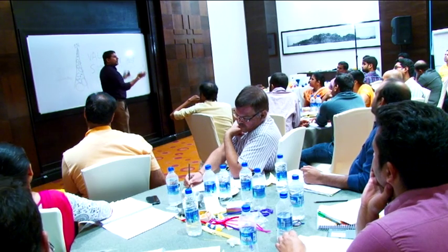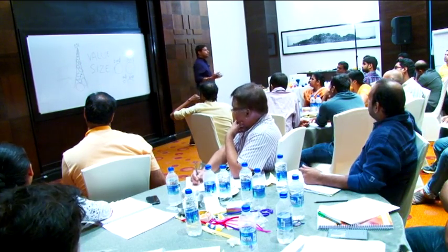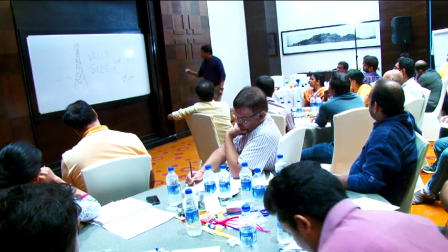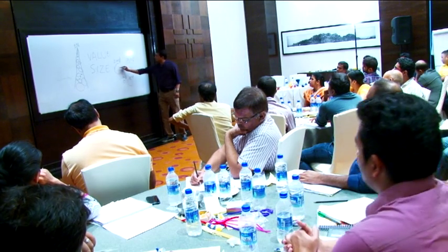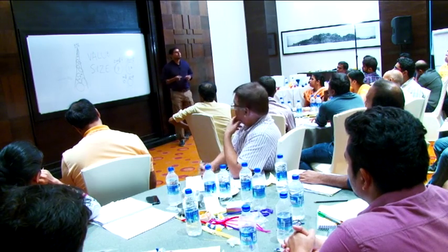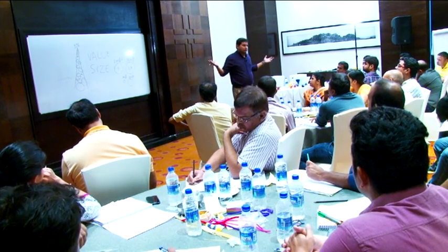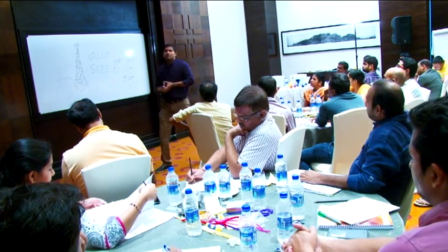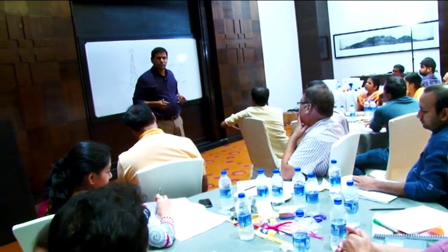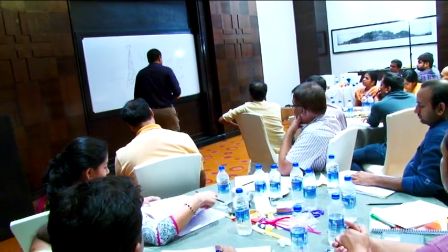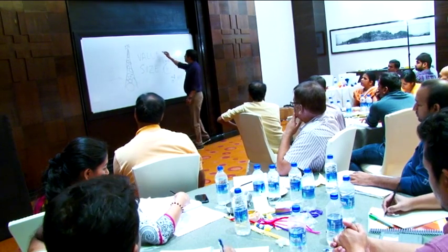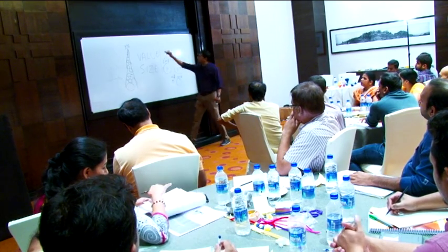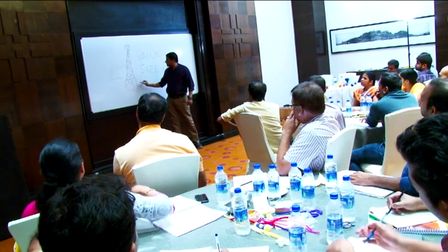So you need to collaborate heavily. Please remember, heavily. Product owner and the dev team. So how do they define the size? This is size. This is value. How do they define the size? So many factors. I may consider complexity, I may consider uncertainty, I may consider what kind of work is involved. It's a collaborative effort again, right? So these two factors are not related, but they help the product owner to put an item either here or here.